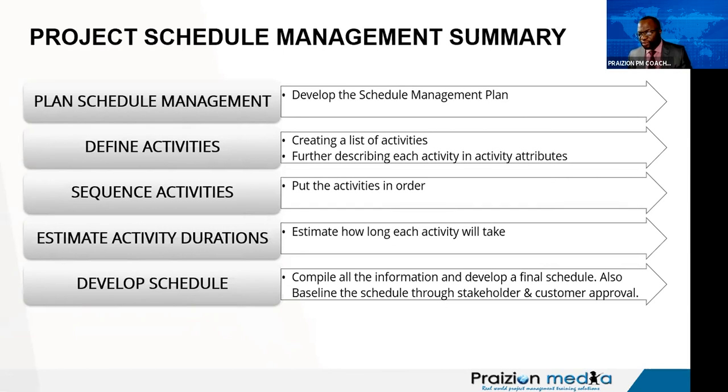Now, something else to realize from this talk is change requests, which do not typically appear a lot in planning, can be seen. It says, modifications to the project or to the project scope or project schedule may result in change requests to the scope baseline and other components of the project management plan. Schedule change requests are processed for review and disposition through perform integrated change control. Preventive actions may include recommended changes to eliminate or reduce the probability of negative schedule variances. So what are they trying to say?